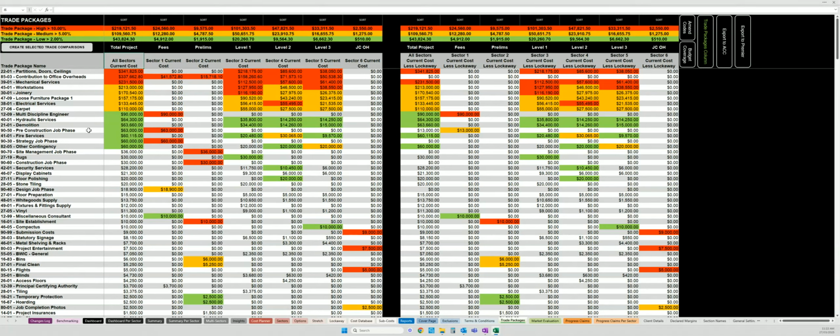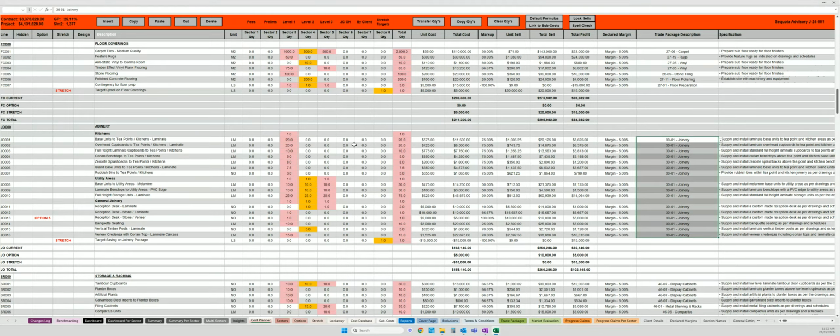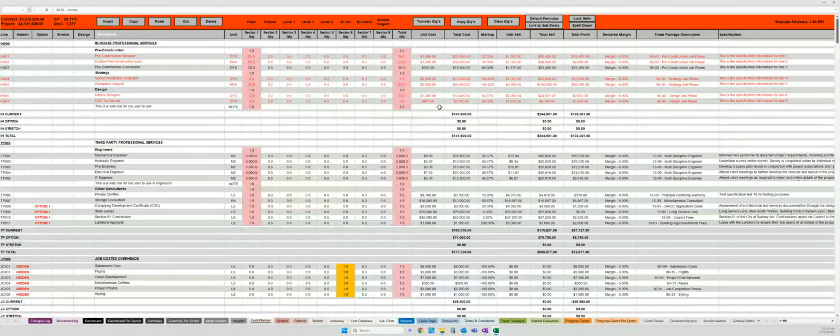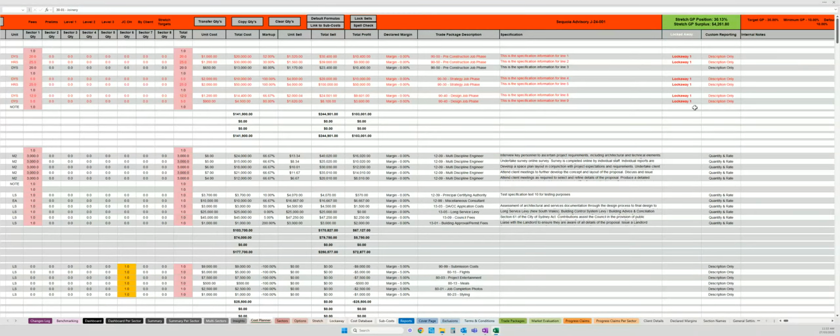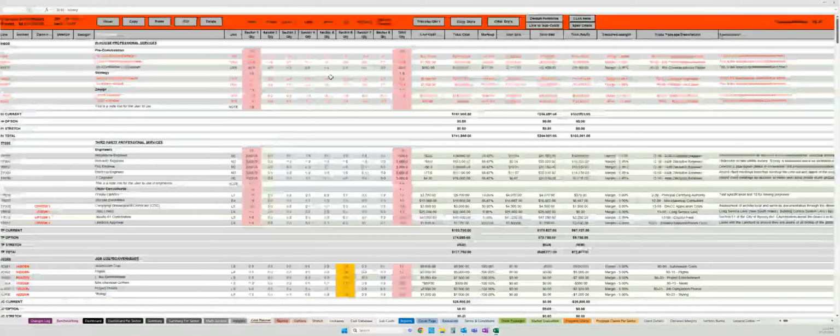The other thing to be very aware of is because we work in CostrixIQ with clients very early, and we may have phased procurement where certain elements are contracted early and others are not, we have the ability to lock away portions of scope. And so just to remind you, in the cost planner, we have the ability to lock away certain lines.